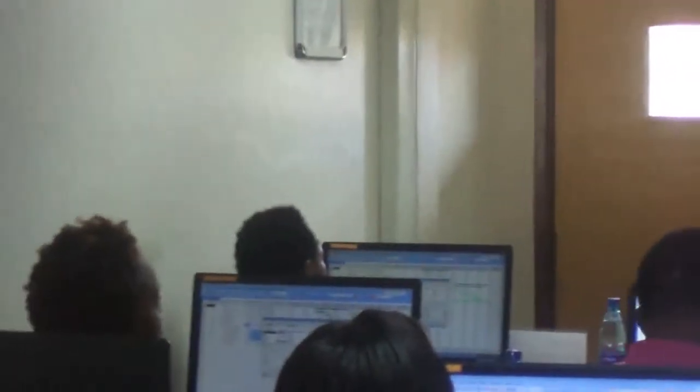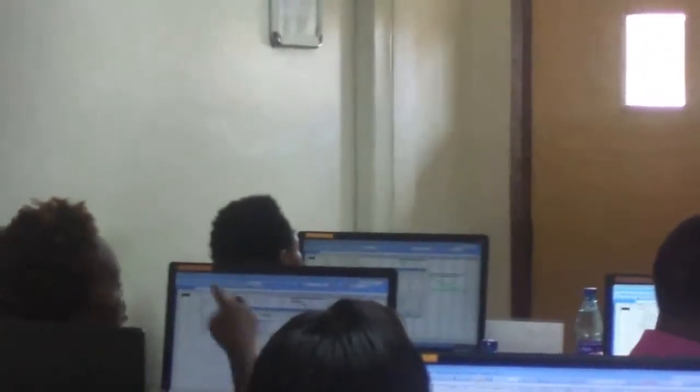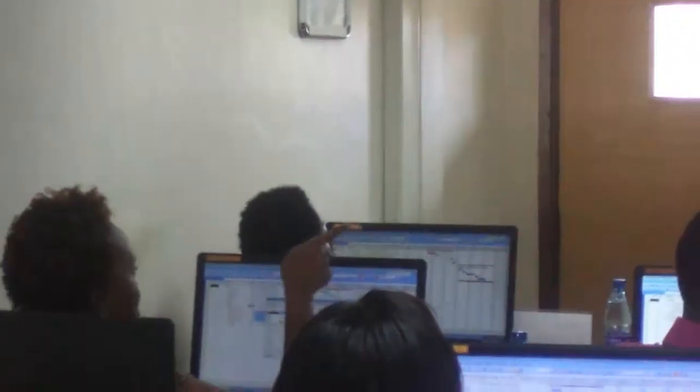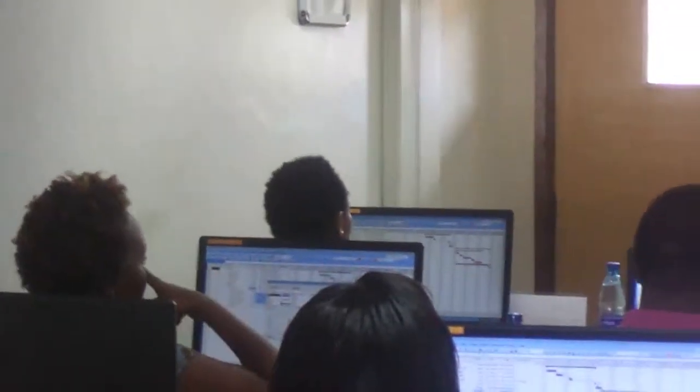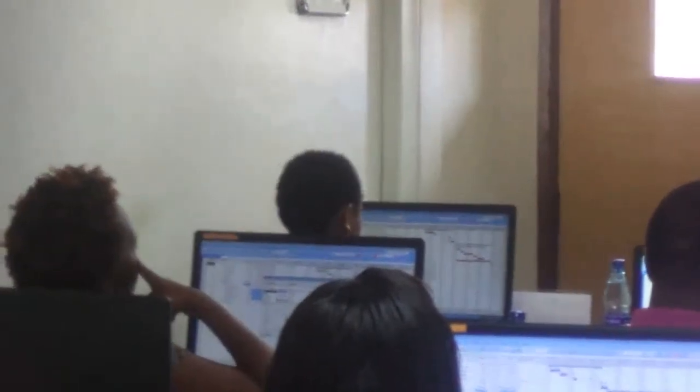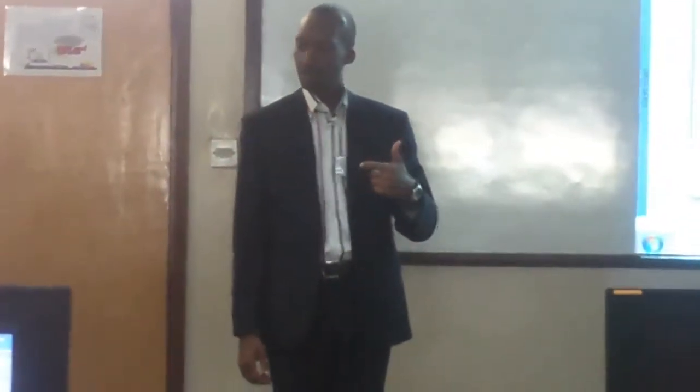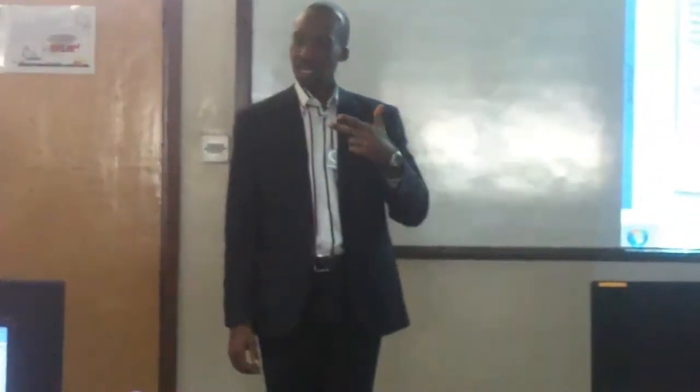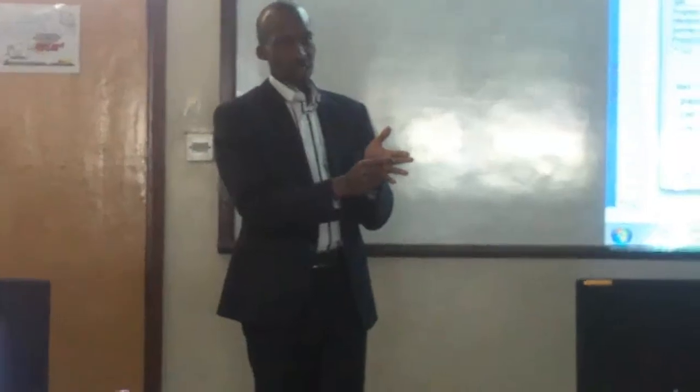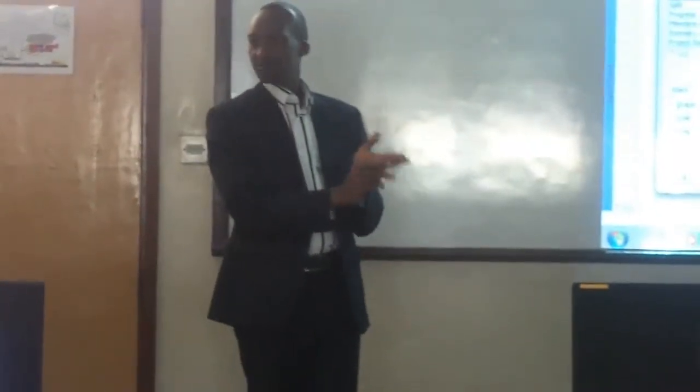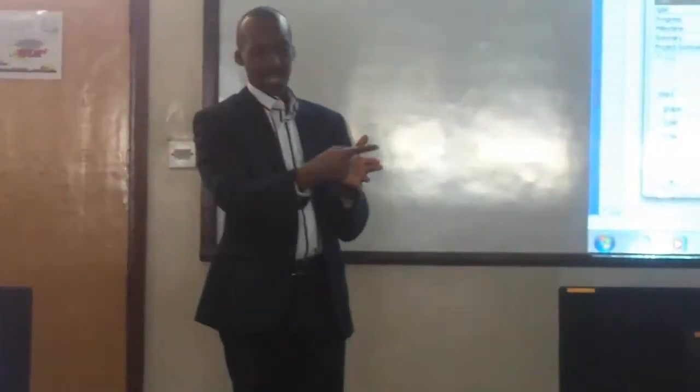If you're running late, there are two things here. First, you must have saved a baseline. We've not yet saved a baseline. Two, the minute you save a baseline and you do what we call tracking your project, there are two colors, blue and gray. The gray bar appears below the blue bar. So what you want to be looking at is your blue bar, which is actual. Your gray is your baseline, telling you this is what you should have been doing. So sometimes it's ahead.